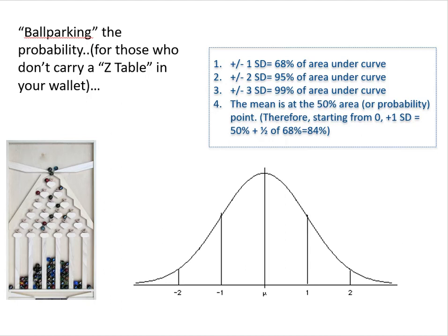Furthermore, you can push back. If your boss says, I want you to reduce from this schedule, you can figure out how many standard deviations to subtract from the schedule and what the probability of that would be. And since the midpoint is already 50%, the further you go to the left, the smaller your chances.